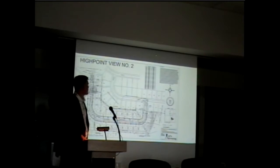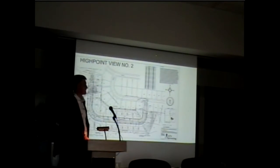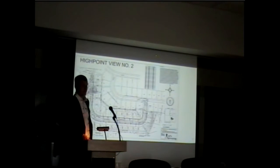And so this is our preliminary plat that we put together. This is something that if we were going to take this project to the next step, we would submit to a number of different departments, like the road commissioner, the drainage commissioner, MDOT, the health department, and then obviously the plat board in Georgetown to get feedback on how our plat looks and whether or not it would be approved. So to talk more about our preliminary plat, it's Jay Carpenter.